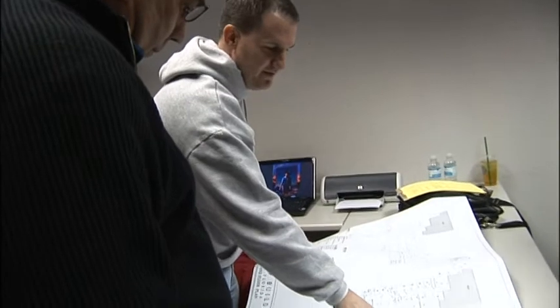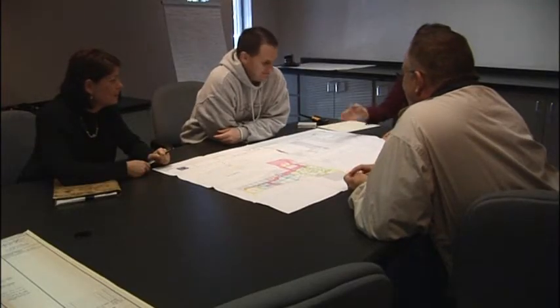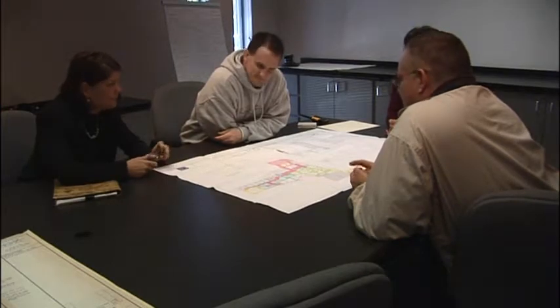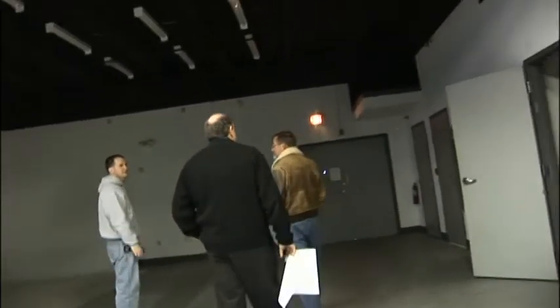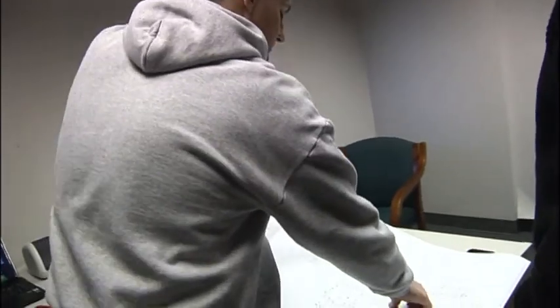We basically interviewed 2 flooring companies, 2 architects, 4 general contractors that also had flooring and architects in their bids, a couple custodial companies. So in the end, we've gotten bids from more than 10 different companies for varying services. And I don't think we were expecting to get bids that were literally 3 times what our budget was. So we had to do some really fast deciding what was a want and what was a need to get our scope down to a reasonable amount for the budget that we had.